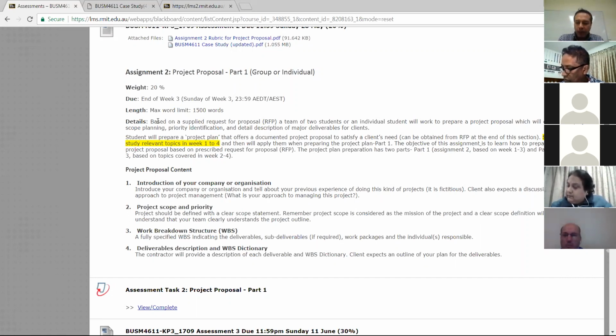So what do you think about WBS? What are the activities that you are going to put in the WBS? What are the stages of procurement? So what do you think about procurement? What stages do we have? The WBS will have the procurement activities like analyzing all the brands and the price negotiation. Then finding out the delivery, or whether they have the stock or not.